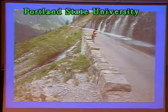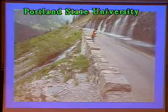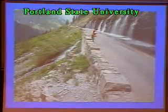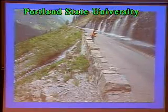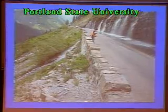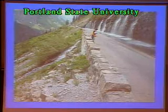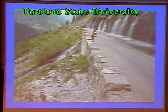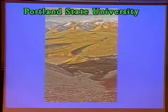The decision was made in Glacier to limit the types of vehicles that use the road. So nothing over 24 feet long is allowed to go over the Going to the Sun Highway. It would be too expensive and too impactive on both the historical character of the roadway as well as the other park resources to widen the road there. And so that's the context in Glacier: the road is basically being reconstructed to the same template it is now, and much of the work done there is primarily repairing the walls, which are very extensive and very expensive, and then rehabilitating the highway surface, the pavement surface.